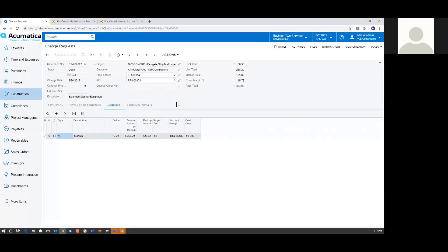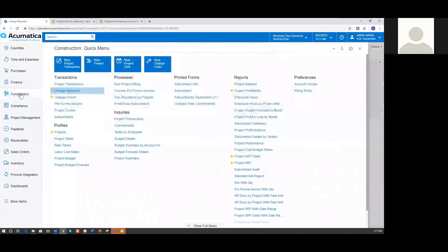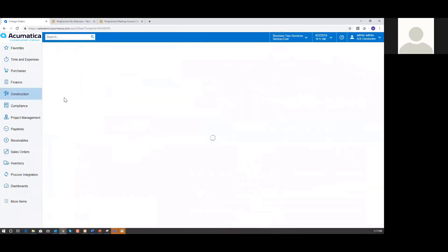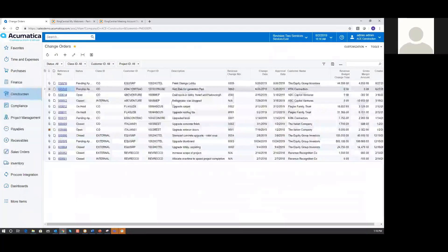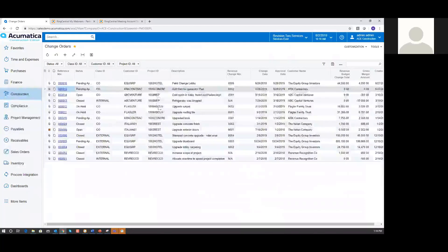So we've created our change request out of a project issue and an RFI, and it's sitting here open. The next step, once it's gone through the approval process, is to create a change order from this change request. I'm going to go back to my construction workspace, and right below Change Requests you'll see Change Orders. I'll click on Change Orders, and this gives us a list of all the current change orders in the system. I can sort and filter this by status, project manager, or project, and I'm given a list of all change orders currently waiting for me as a project manager.